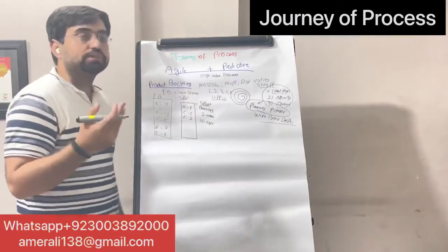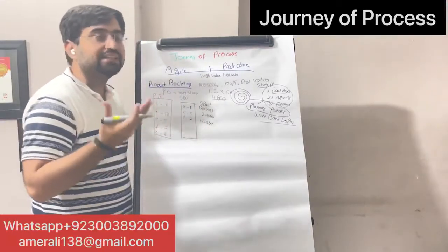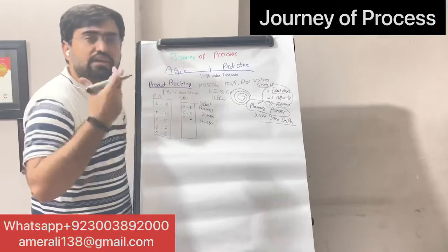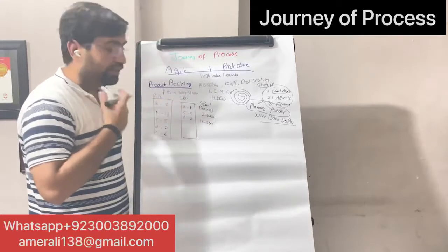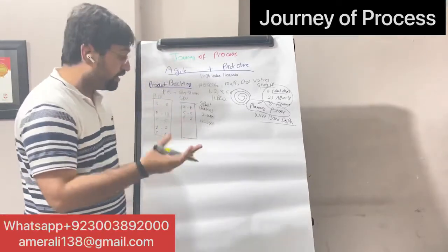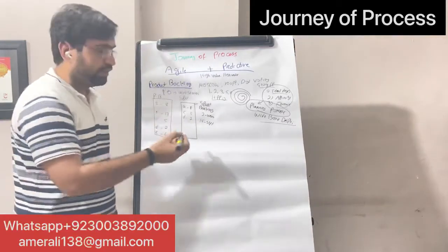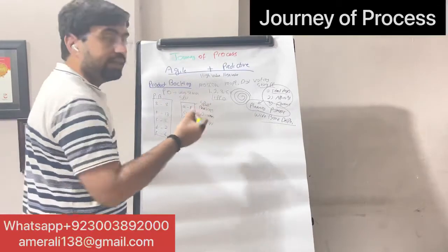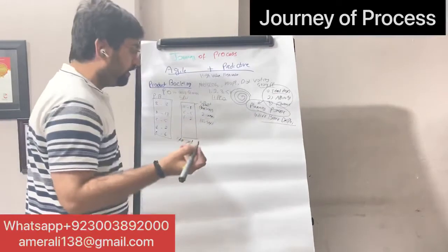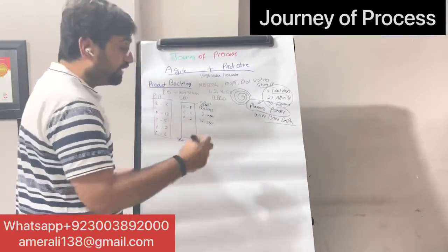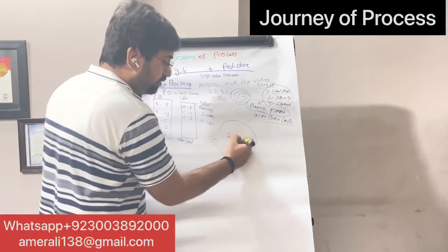It is important to understand that when you are working in sprints, you cannot do half work. In agile, there is nothing like 99% of the work or 95% of the work. Agile is always 100% of the work. We have to complete 100% of the work of the user stories, so we cannot take something we know will not be completed. Once the sprint backlog is ready, we share the sprint goal with the stakeholders and sponsors. The product owner also agrees, and then we start working on it for 2 weeks.